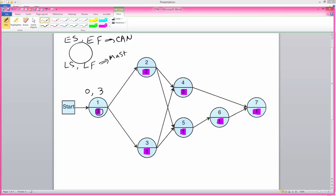Activity one must be completed before activities two and three can begin. So the earliest time that activity two can begin is week three, plus two, we get five. For activity three, the earliest start time is also three because activity one must be finished before it can begin. Three plus one is four.